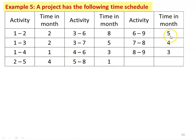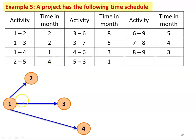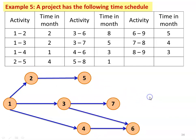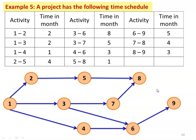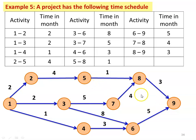Continuing: activity 5 to 8 is 1 month, 6 to 9 is 5 months, 7 to 8 is 4 months, and 8 to 9 is 3 months. We have to calculate the critical path of the network. The network is drawn with the activities and their times shown above the arrows. We have to calculate the earliest expected time, latest completion time, the slack of every event, and find the critical path.